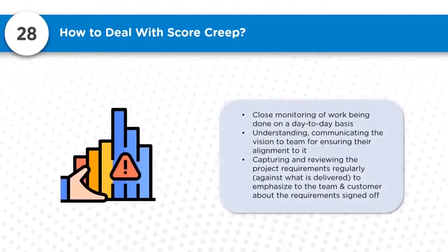So to avoid scope creep, to deal with it, one has to ensure close monitoring of the work being done on a day-to-day basis, because scope creep can happen through team members influencing, or team members being influenced by the customer, and because of that it may happen.